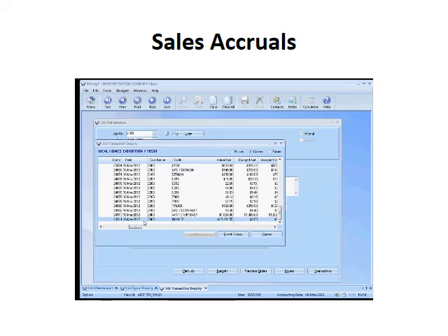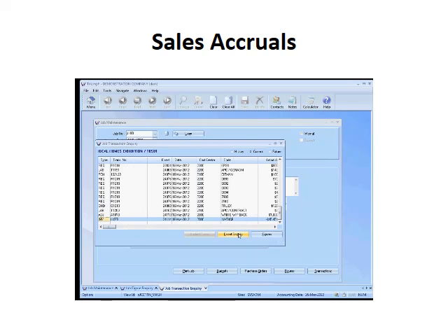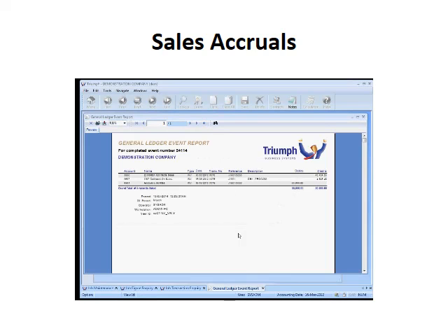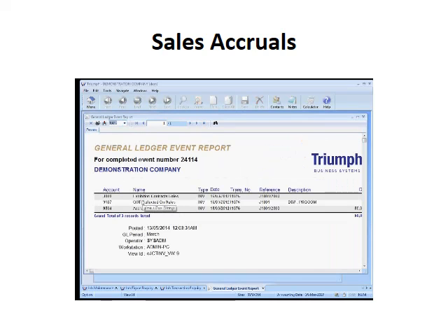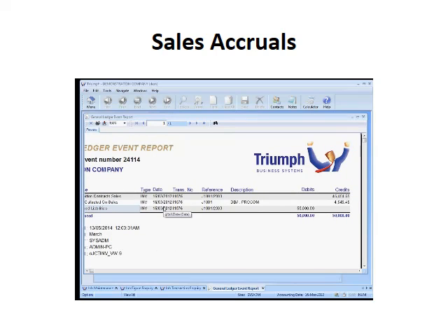Plus tax essentially. And if we look at the event inquiry that creates, it's creating the entry coming through to sales and to the potential GST liability, and putting it through as a debit account being the accrued liability. So therefore it produces revenue on the job for all of your profit and loss reporting on a job, even though you haven't yet produced the invoice to the customer.